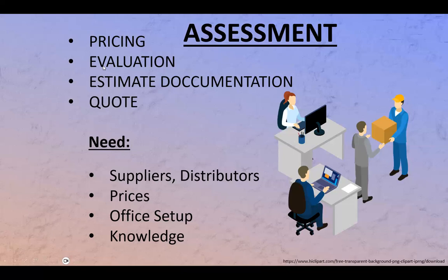This is where a lot of companies fail. Maybe you need 200 data jacks, you order them, and it just turns out you need 20 more jacks. Okay, you're going to bite the bullet, because once you give the quote, you've got to fulfill it.